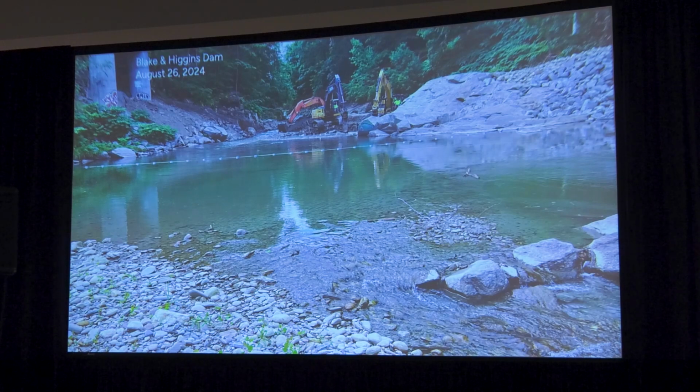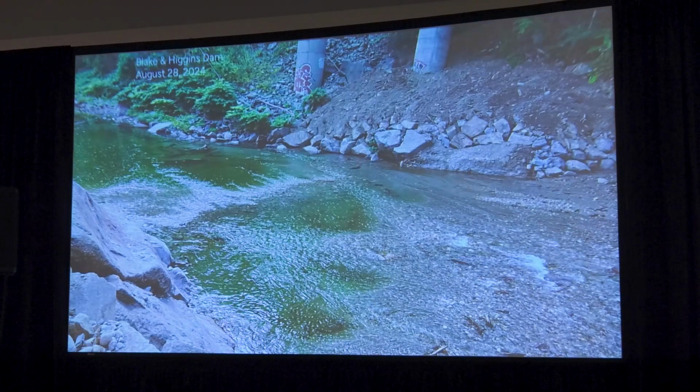So this is a spot where it's backwatered by this pool. We're standing down near the riffle that controls the pool, and the dam site was actually backwatered. We had originally said we're going to take it down to bedrock, and that was the goal. It turns out the concrete went some amount deeper than that, and the contractor couldn't reach anymore. So we needed to, I think the next slide shows it.